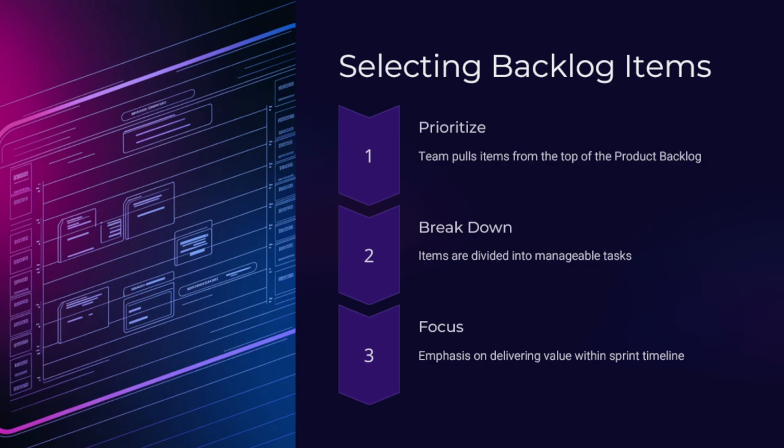If you recall, when we said that maybe one of these features is an epic, and each of these epics will have different user stories. And each of these user stories will have different tasks and subtasks. This granular planning helps the team to estimate the effort more accurately, and focuses on delivering incremental value within the sprint time frame.